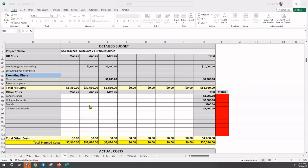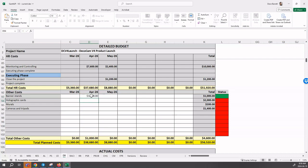So what you need to do is look at your schedule and determine when will the banner stands expense be incurred. Now this will be one thousand dollars. Based on the schedule, the thousand dollars occurs in April.